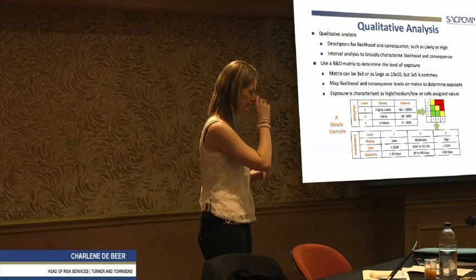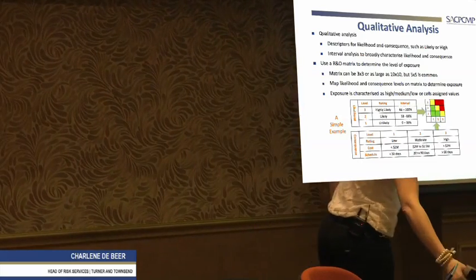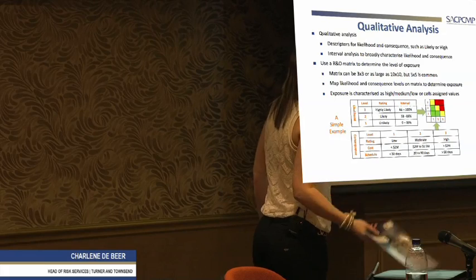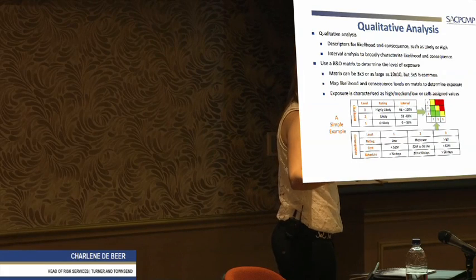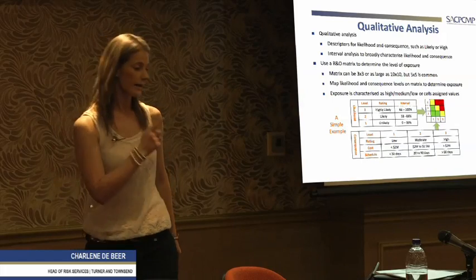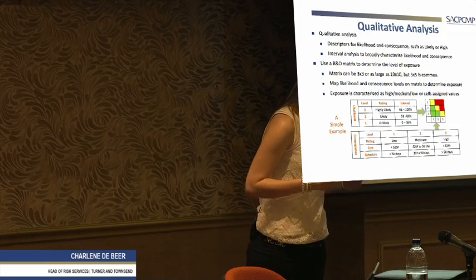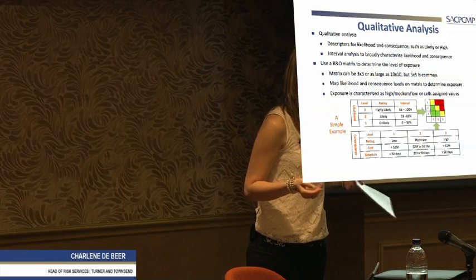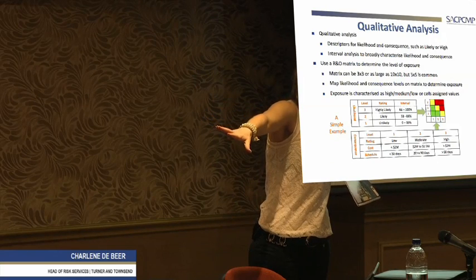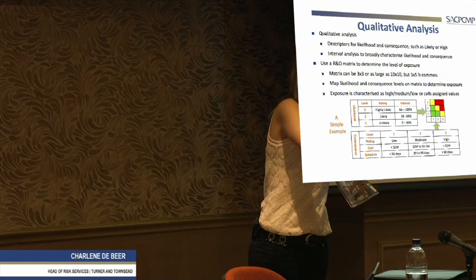People think a risk register is a swear word. But we're saying that if you have a risk register, you've costed it and you've scheduled it. So you don't have a P0 cost or a P0 schedule, you've got a P30 date. Let's say, for example, you build in 30% float and 30% contingency. But now I can back up my 30%. If any auditor or exco member comes to me and says, well, you've costed 20 million, where did you get it from? I'm going to say, well, all these risks, just these risks. If any other risks happen, I don't have contingency for them because we haven't identified them. These ones I've costed and scheduled for.